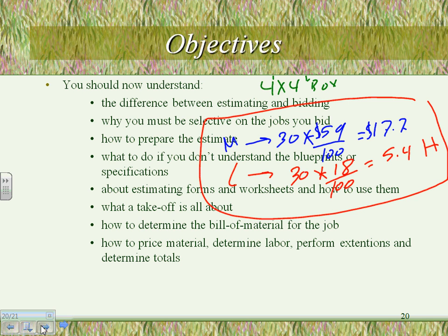Next step, Mr. Erbab, when you come back from your break, we're going to take these hours and convert them into what? Dollars. Why do you think they put the labor in hours? Because I pay my electricians differently than you pay yours. But an hour is an hour. To convert this into dollars, I can assign $52 and do the math on how much it will cost me, or I can assign $25 and do my math based on how much I pay my electricians. Great. Thank you, guys.